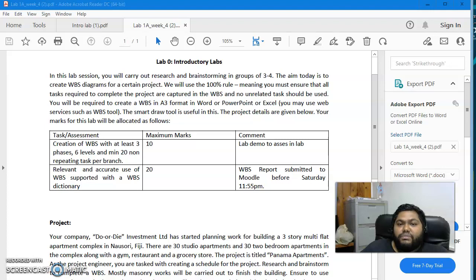Then you have to break down the elements. To break down the elements, first of all, you begin the process of breaking the level 1 deliverable into unique lower level deliverables. This breaking down technique is called decomposition. From there, you continue breaking down the work until the work covered in each element is managed by a single individual or organization. Ensure that all elements are mutually exclusive. You have to ask the question: would any additional decomposition make the project more manageable? If the answer is no, the work breakdown structure is done.